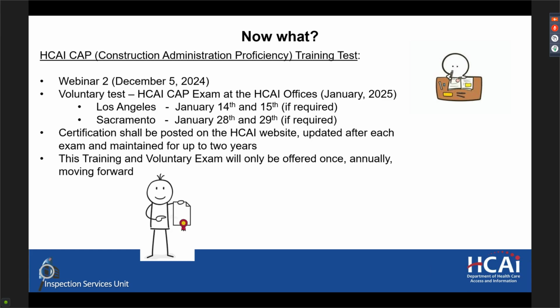In terms of having that set on site, it is the IOR's responsibility to have the latest approved set available on site because that's what he is inspecting to. But the contractor may also want the same thing for project engineers to review and refer to when they're administering or building to the work. So it is a project team decision, but the code requires that it's the inspector who maintains that file system.